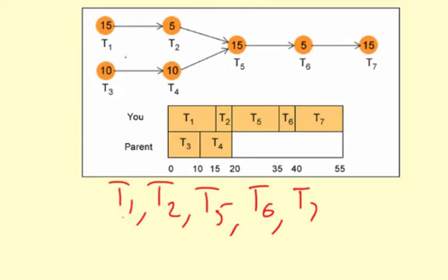Okay, so here's critical path scheduling. I'm going to start with task 1. And task 1 is going to start first. That actually goes right here. And then what I'll do is I'll kind of cross this off. And then I'm going to make a new critical path calculation and then determine what has to happen next.